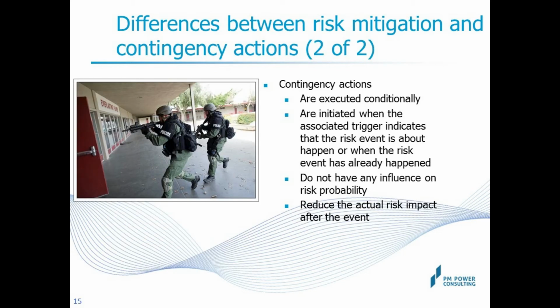Continuing with the same example from the previous slide, you may choose not to go in for any mitigation action, such as the mentoring program. Instead, you wait to see the quality of code from the fresh developers. Some may produce good code, while others may not. You then send the people who are not up to the mark for a remedial training.